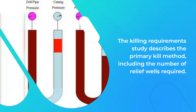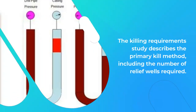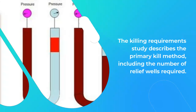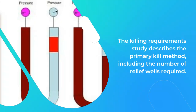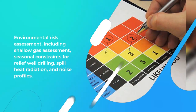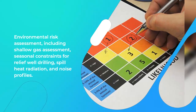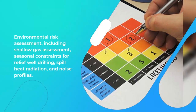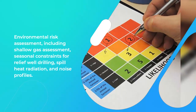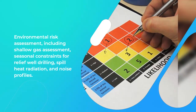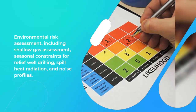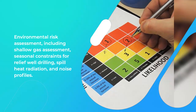The killing requirements study describes the primary kill method, including the number of relief wells required. It also covers environmental risk assessment, including shallow gas assessment, seasonal constraints for relief well drilling, spill heat radiation, and noise profile.